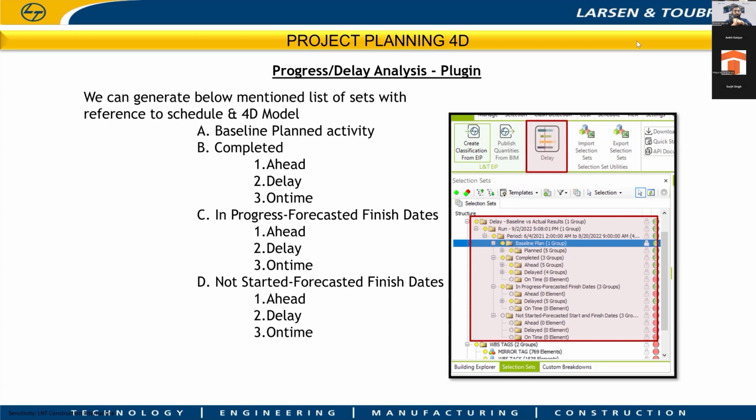And there is another bifurcation within the completed activities: it also shows where you are ahead of your baseline and where you are delayed against your baseline. Even though an activity is completed, it will go into detail on whether you are ahead, delayed, or on time compared with your planned schedule.